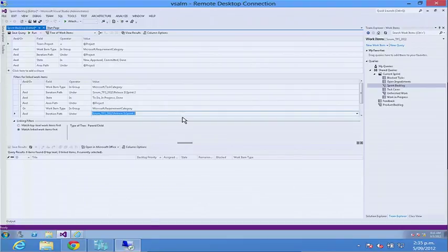It's another one of those housekeeping tasks about closing off a sprint and moving to the next one: updating what the current sprint is on the query. So I'd recommend, if you do it this way, and don't use the trick I'll show you at the end, you rename that query to be sprint 1 backlog, sprint 2 backlog, and then everyone understands what they're looking at. Otherwise, people assume that current sprint is going to magically find the things that are there, right? Okay, so I'm going to save that. Now I've changed it to be sprint 2.